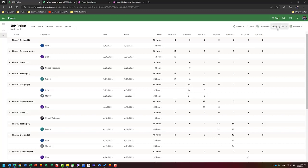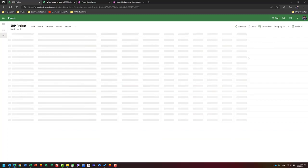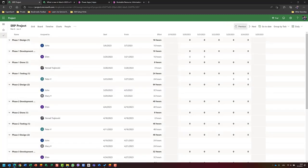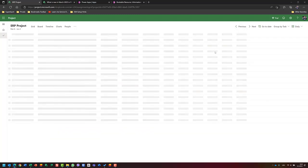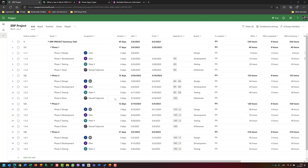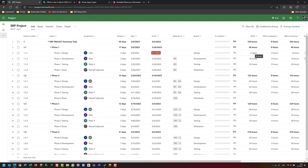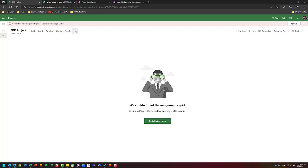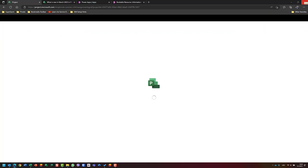Let's go back to group by daily. In phase one design, starting from 6th of March, I can edit and say John should work 4 hours on a specific day. What happens? Going back to the grid, John in total will work 8 hours — and since this is a fixed duration task, he works 4 hours each day. I attempted to set 16 hours per day, but got a 'could not update assignment' error — so I refreshed the page.